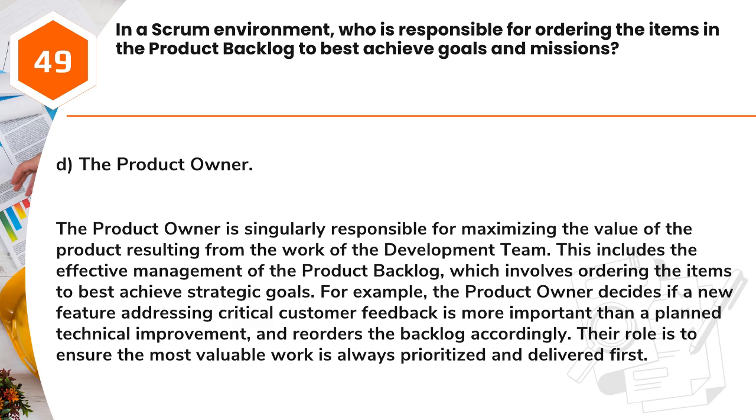For example, the product owner decides if a new feature addressing critical customer feedback is more important than a planned technical improvement, and reorders the backlog accordingly. Their role is to ensure the most valuable work is always prioritized and delivered first.